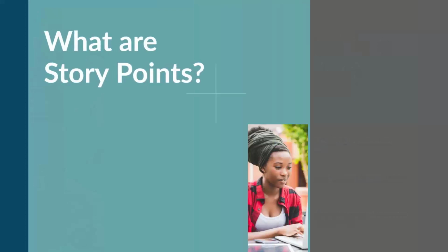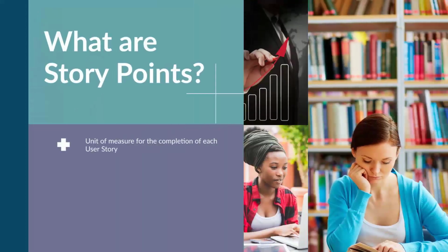What are story points? Story points are the unit of measure for the completion of each user story. Estimates are put together keeping in mind the amount of work needed, risk, and complexity of the task at hand.